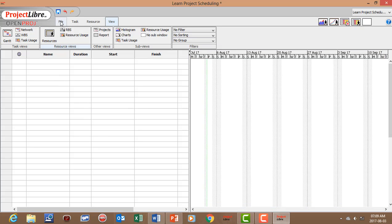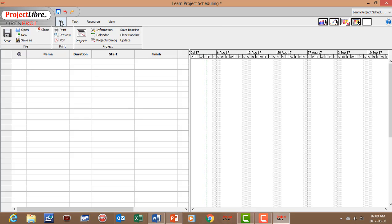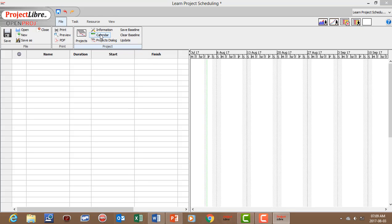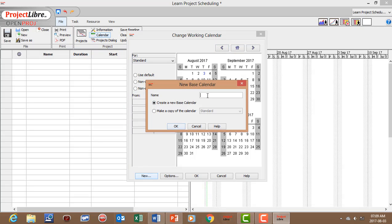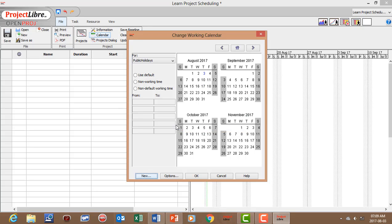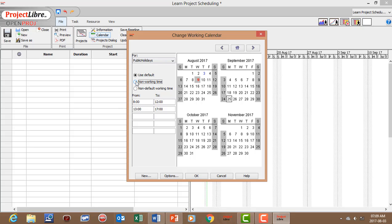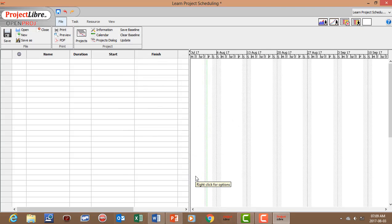Let's start by going to the File menu, which relates to aspects of the entire project. Let's create our base calendar first. Go to Calendar, select New Calendar, and give it the name 'Public Holidays'. We're creating a calendar with non-working days: the 9th of August and the 25th of September are non-working days. Save that.